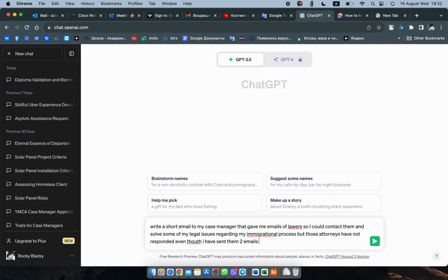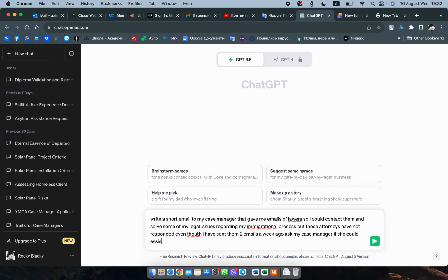He owns this whole process. He's going to make sure we put the stuff in the product backlog. He's going to make sure we have a sprint planning meeting. He's going to make sure we start to pull out stuff and put it in the sprint backlog, or he may do it for them. And he's going to monitor and control this sprint over 2 to 4 weeks. The way he's going to manage it is by having daily Scrum meetings.